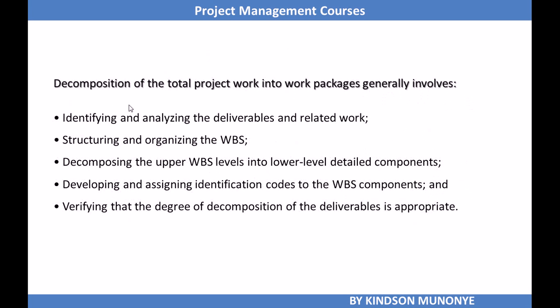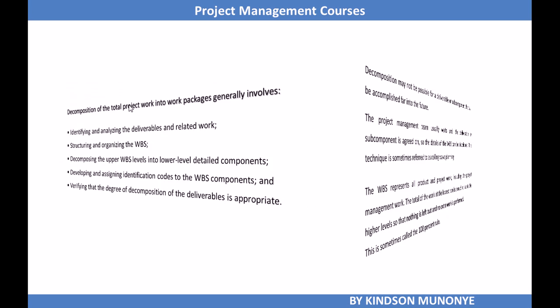There are some things you need to know about the decomposition. The decomposition of the work involves identifying and analyzing the deliverables and related work, structuring and organizing the WBS, decomposing the upper WBS levels into lower level detail components, developing and assigning identification codes to WBS components, and verifying that the degree of decomposition of the deliverables is appropriate.